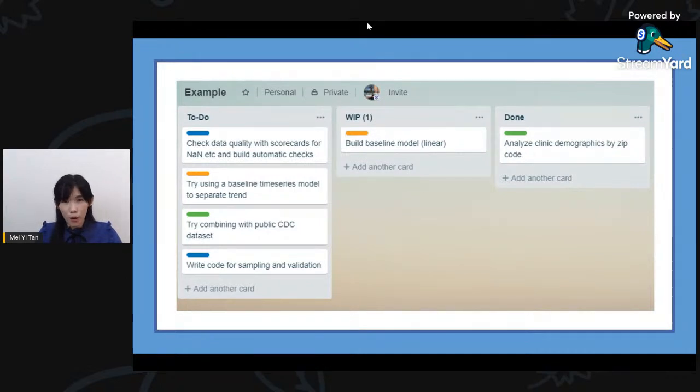In terms of the modules, you will need to define how large your module is and how much data is involved. When we talk about the scope, we need to think of how many data sets are involved. And then of course, another thing is the requirements, which is how many people are giving you the requirements, how many stakeholders are involved in this project.